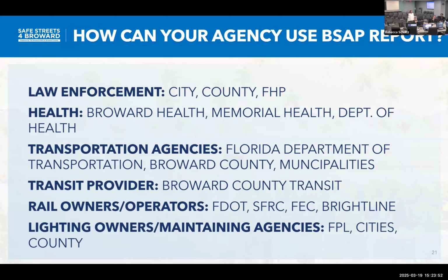Well, let me use this as the avenue to talk about this. It's all tying into implementation and adoption, but we're anticipating that at our local level, Rick and Eric and Karen, with some of the cities that have projects on our priority corridor list, we would go to the city, and before those projects could move forward in our MTP, we would need a resolution of support from the city.